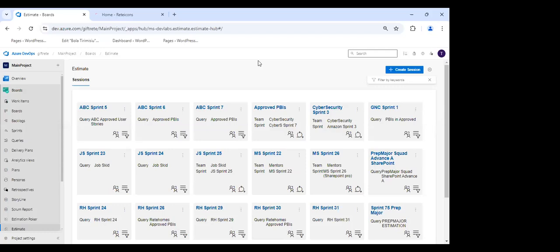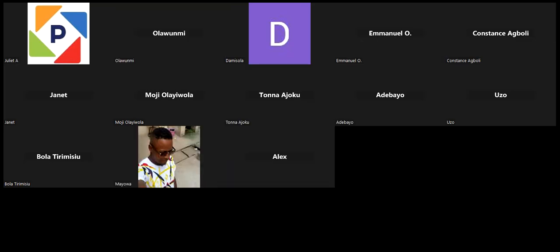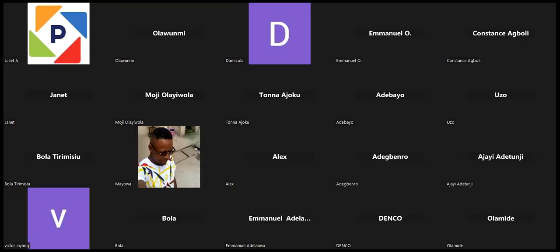All right, so I was just going to do a little voiceover for them so they can have a brief understanding. You see the first ceremony they did. Officially, they had not started the sprint. That's why they did the refinement. And you remember what Bola just said, you could refine it as much as you can within the sprint, but don't overdo it so that you don't keep calling your team into unnecessary ad hoc meetings, right? Remember, refinement is what we said you do ahead for a future sprint. That's why they are doing it first, because they haven't started the sprint.